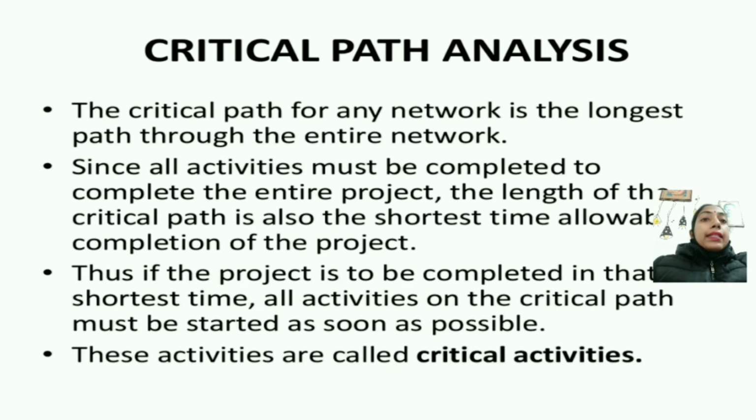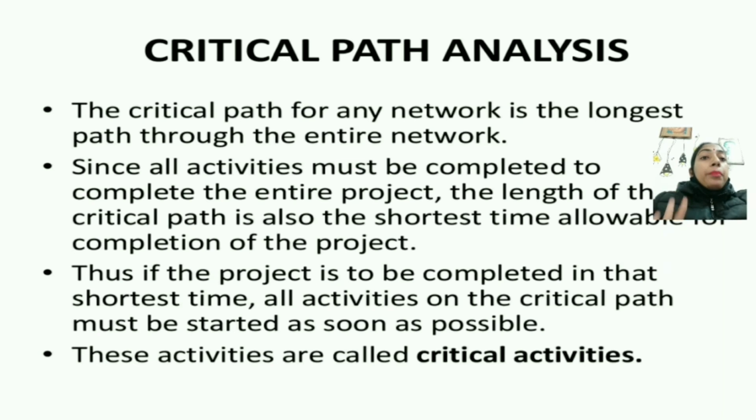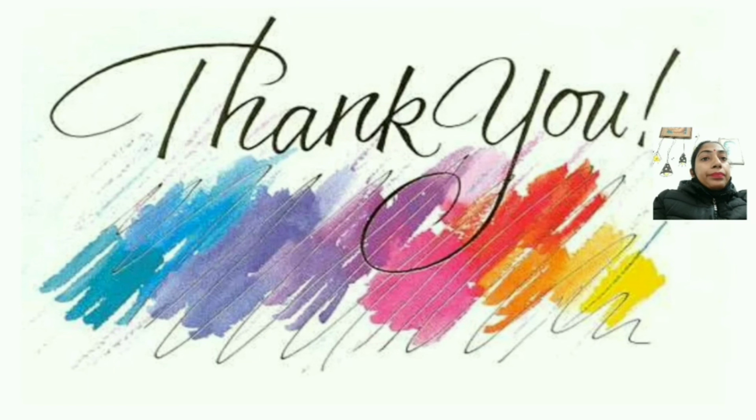Now, critical path analysis. The critical path for any network, as we have already discussed, is the longest path through the activities' entire network. Since all activities must be completed to complete the entire project, the length of the critical path is also the shortest time allowable to complete the project. Thus, if the project is to be completed in the shortest time, all activities on the critical path must be started as soon as possible. These activities are called the critical activities.